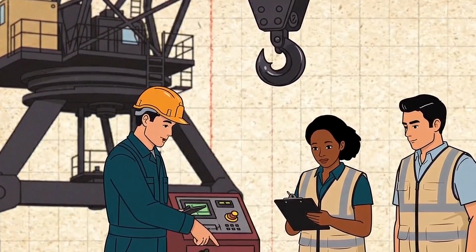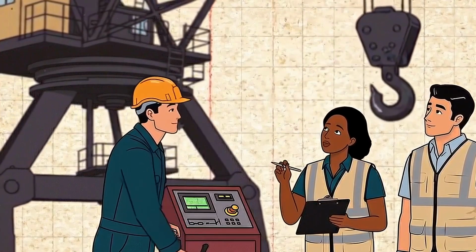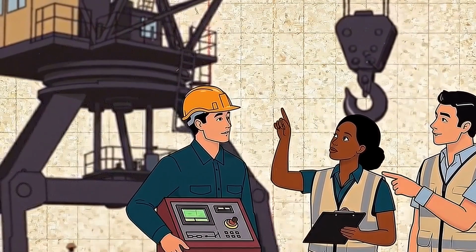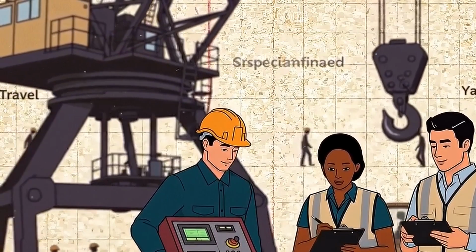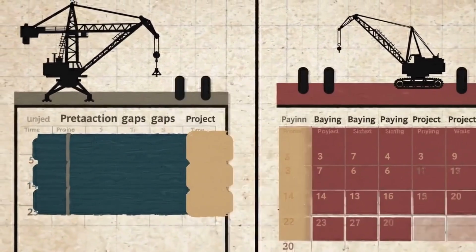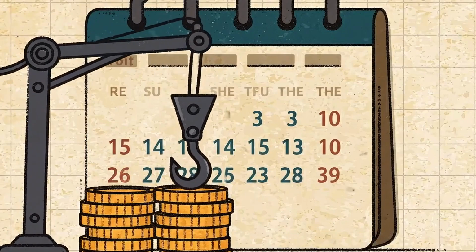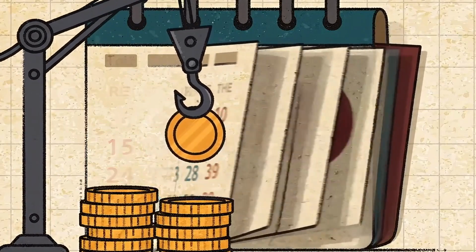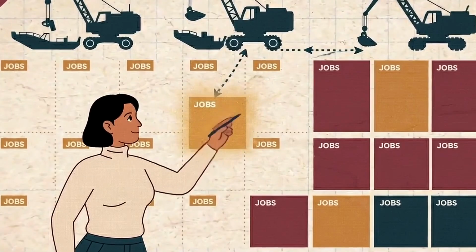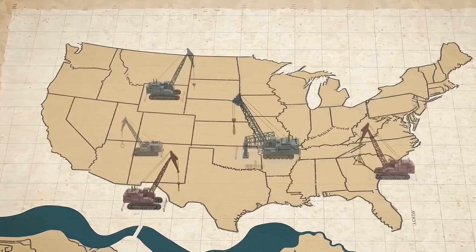Bigge's published pricing for even larger all-terrain equipment moves into quote-only territory. And Bigge separately notes that items such as mobilization, fuel, permits, taxes, and rigging equipment may be billed separately. So the visible rate is not necessarily the total customer cost. This is why comparing crane companies only by the largest hourly number can be misleading. A quote that looks more expensive on the machine itself may package other services differently. A lower equipment rate may sit beside larger transport or support charges. The commercial question is not which line item looks cheapest. It is what the entire job costs under the contract the customer is actually signing.